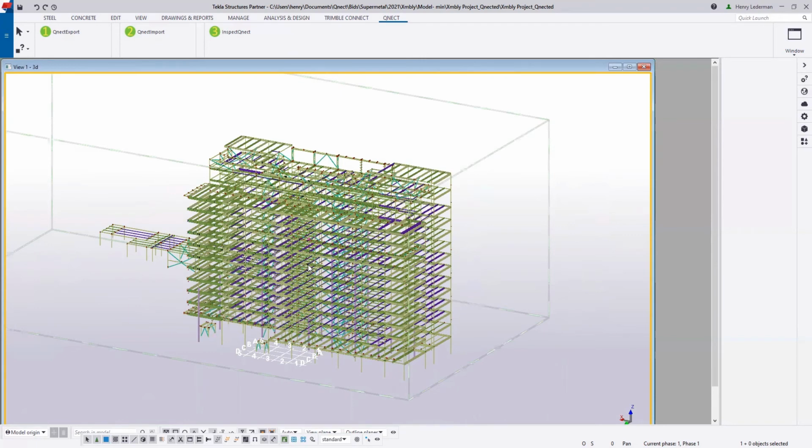This is all about data, right? This is about moving from just taking 10 to 20% of the total tonnage as fitting material to really getting refined and understanding what it actually is. Is it 8%, 10%? But it goes a little beyond that, right?